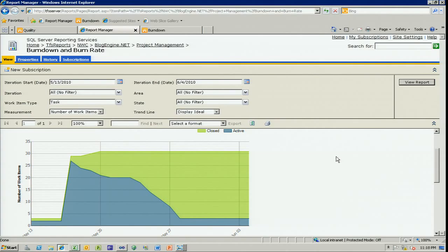If you're running a Scrum team or a team doing Agile, and you're inside of an iteration boundary and you're burning down, some teams like to track hours. Some teams don't. If you don't like to track hours, this is the way to do it. Do it the number of work items. Right? You don't get credit for your task until it's done, until it's checked into the repository. I kind of like that feeling. So I get to see what's done when I'm here. What's checked into the repository, what's ready to go. So that's another, just a concept that you can do.